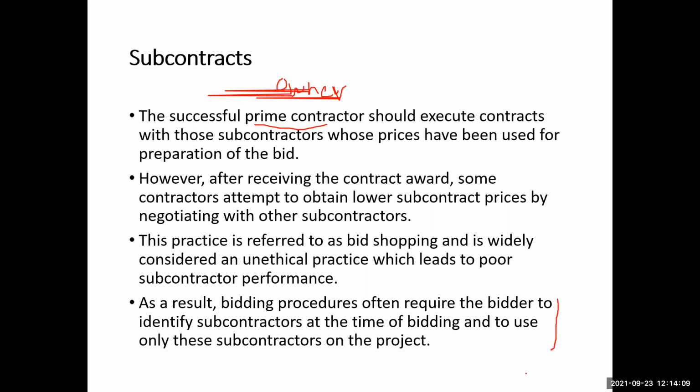However, if the main contractor changes the subcontractors later on, that change will most likely be for obtaining lower prices from the subcontractors, and lower prices will generally also lead to lower quality.